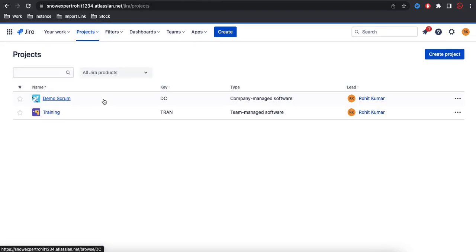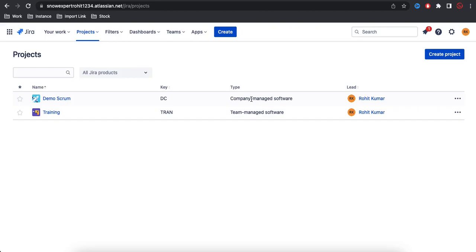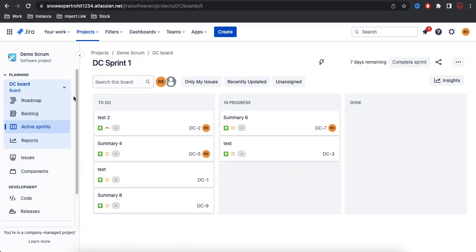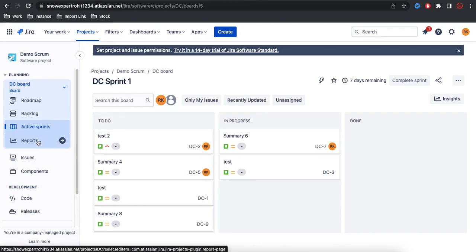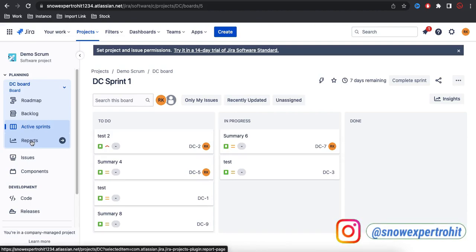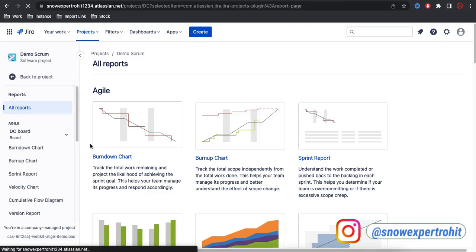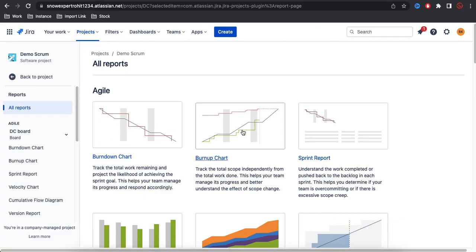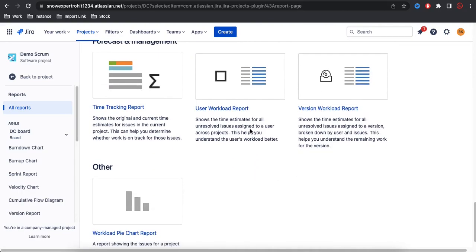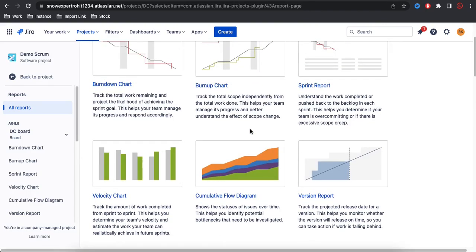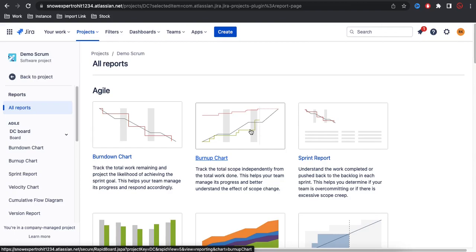I'll go back to the View Wall project and select the company managed project. As mentioned earlier, the company managed project has more control, more options, and more features, but it is a little complex and needs Jira admin help to configure. Under the company managed project, for a Scrum project the report tab is enabled by default. Under Reports, if you select All Reports, you have Agile reports and many more reports available. Remember: company managed projects have more reports; team managed projects have fewer reports. Make sure you are clear on which type of project you have selected.